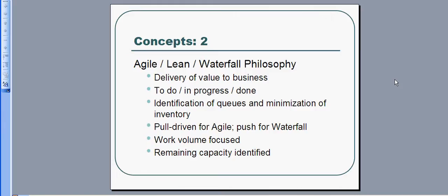The key queues or workflow sub-steps, there's a to-do, an in progress, and a done. We don't get any more granular than that, and in fact done in a lean world would actually be optional, because it's the to-do of one is the done of the other. So it's there to help visually segregate, but honestly it isn't really necessary. This can be a pull-driven model.